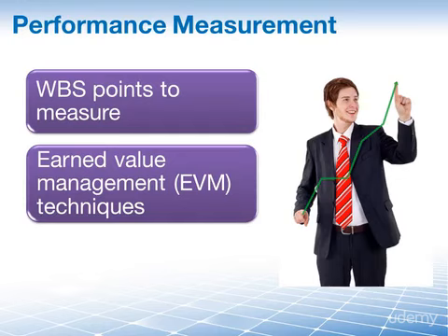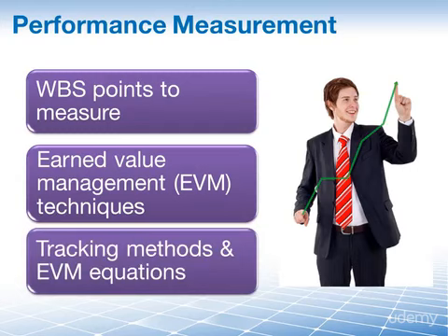For example, if we're using weighted milestones, fixed formula milestones, or percent complete on a milestone. And it may also specify specific tracking methods that we can use, and even go as deep as prescribing which earned value management equation, which formula to use. For example, what formula do we use to measure estimate at completion, because it has multiple formulas available for us to do that.